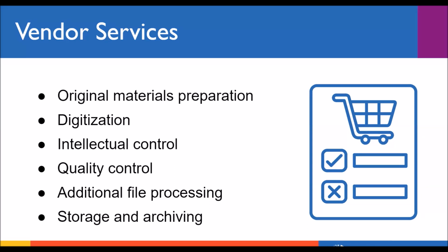If you have audiovisual material, especially magnetic material, those often suffer from what's called sticky shed syndrome. And so those tapes need to be baked before they can be digitized. Thinking about, are any of these included? And if they're not, how much do they cost if they're needed? Those sorts of things. I'm also going to put rehousing under this heading.